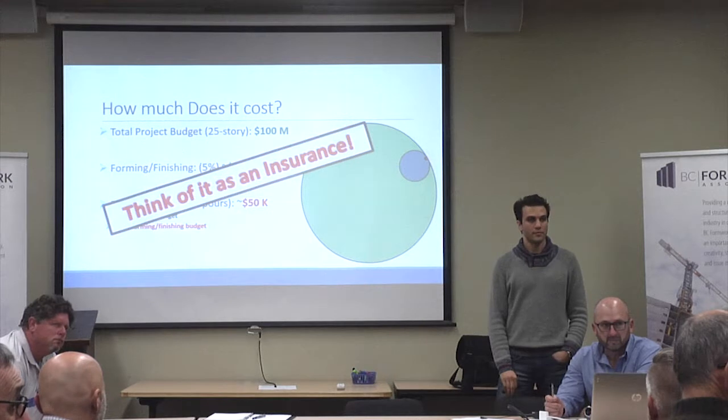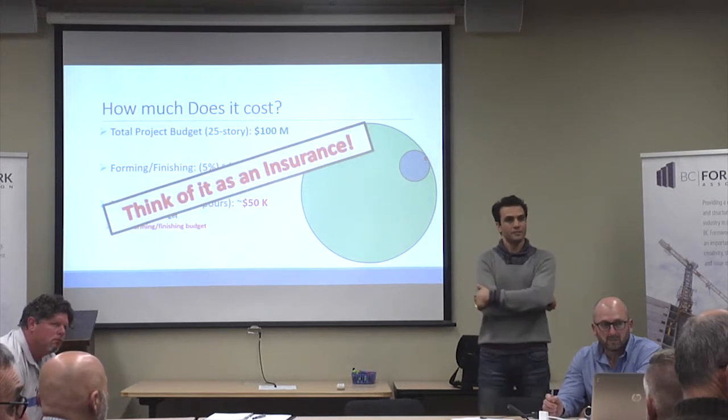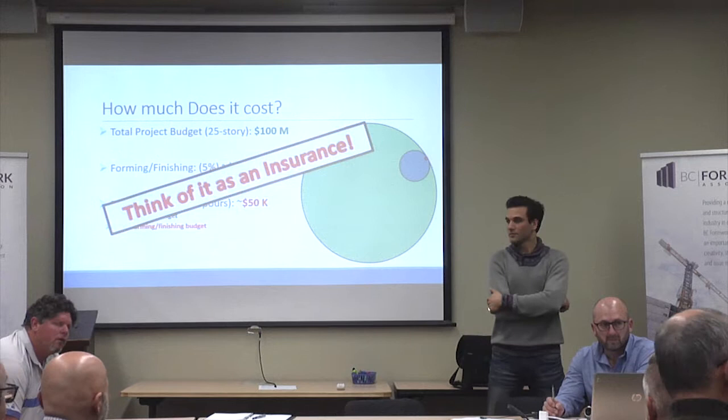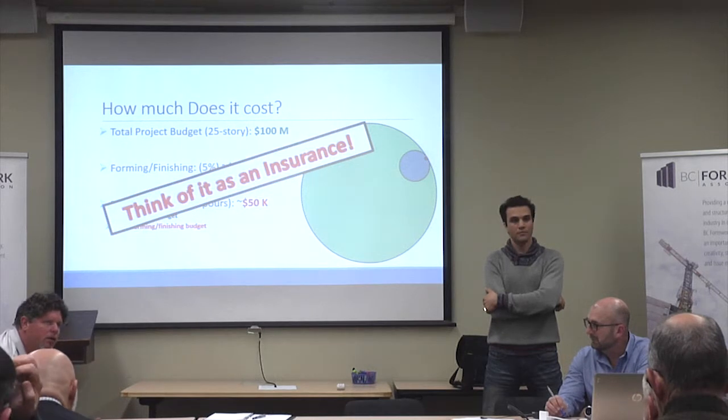Well, hold on, it's only 1 day old, I've dropped it. You go down and you look at the whole thing. If it was the formwork, you could fix your formwork and solve that problem. If it's not the formwork, he'd come in and hammer down the slab. Do you not have a deficiency holdback on your placing? No. Should. Works out well, they come back for it.